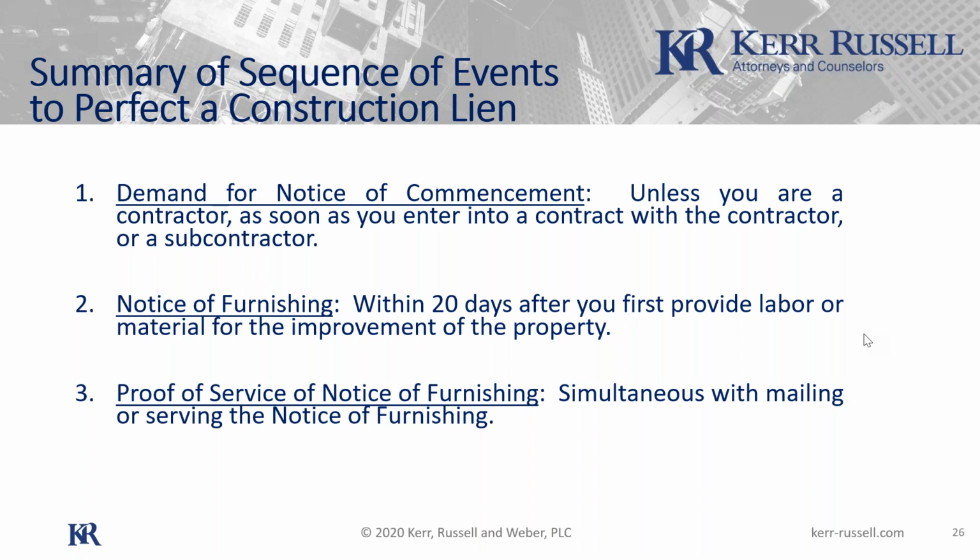So in liens, that's the first step. You send out the demand. Then the next step is a notice of furnishing that we've talked about quite a bit today. It's supposed to go out within 20 days of your first providing labor or material. So if you were trying to train someone, you'd want them to be aware of that 20-day mark. It can be extended by the time it takes for the owner to get back to you with a notice of commencement. So within 20 days of getting that back is actually the extended deadline.